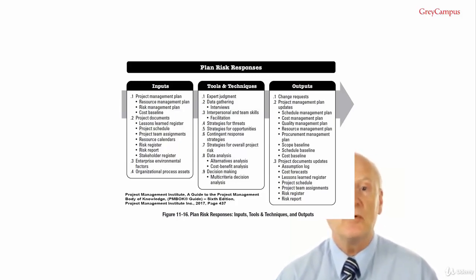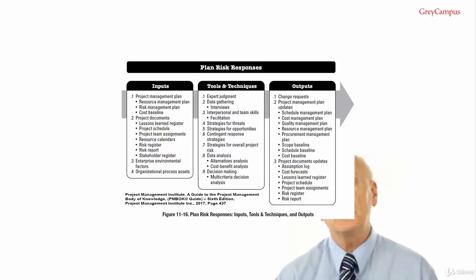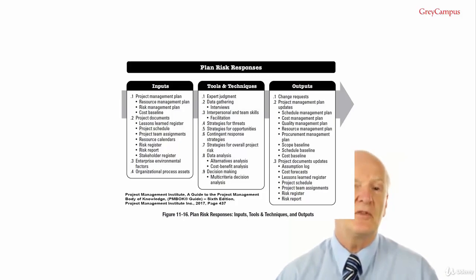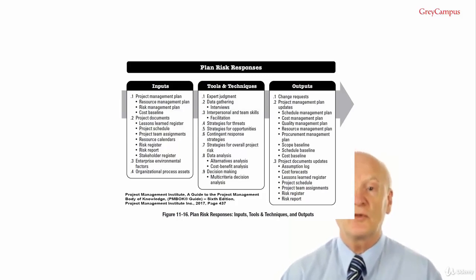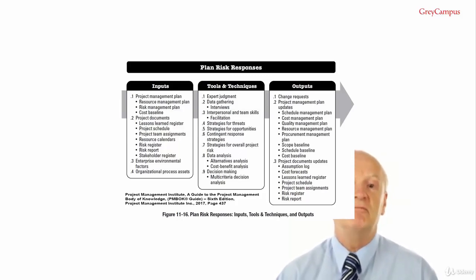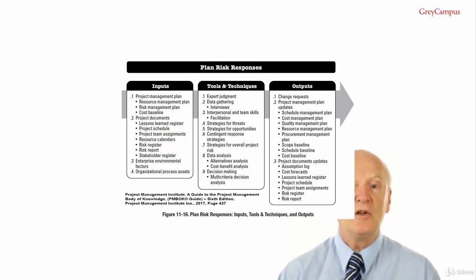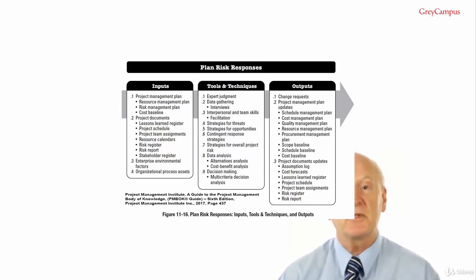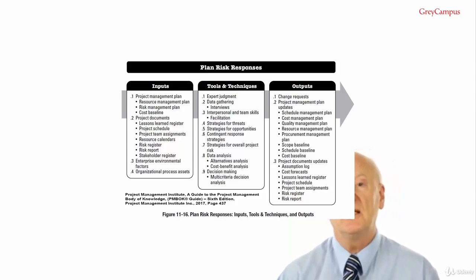In the case of a high possible overall project risk, ownership may be shared in order to reap the associated benefits. Examples of both transfer and share strategies for overall risk include setting up collaborative business structures in which the buyer and the seller share the overall project risk, launching a joint venture or special purpose company, or subcontracting key elements of the project.